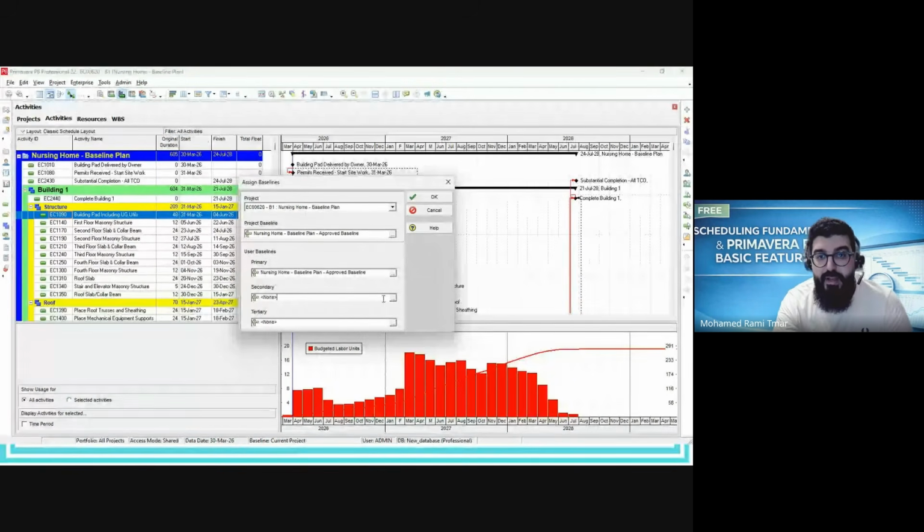Okay, the question of our friend, is the update done manually? The answer is yes. For me, I never use any automatic system to update my schedule, except the integration of software, like for example in the engineering schedule. Engineering schedule is usually linked to the list of deliverables. We name it MDR, master deliverable list, or list of deliverables.